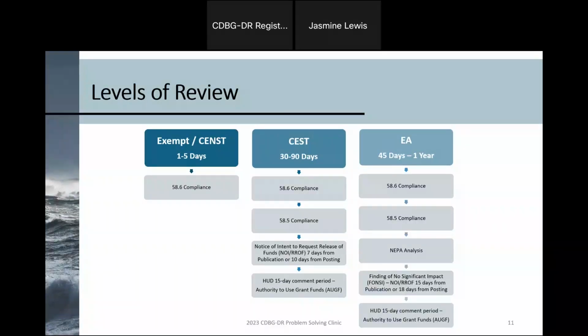Environmental assessments require additional analysis under NEPA, such as determining the cumulative impact the project has on the environment and vice versa, as well as evaluation of alternatives. Environmental assessment factors take into consideration land development, how the project fits in the community, site safety, community facilities and services, including infrastructure, natural features, socioeconomic conditions, and most recently, climate change. Environmental assessments cannot be converted to exempt.